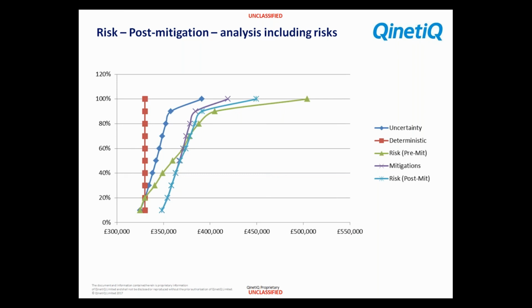Now, this is going to be relevant later on, but a lot of organizations pitch their budgets at 50th percentile. Okay, 50th percentile they choose because, well, if you do enough projects, some you win and some you lose. If you give your project managers a budget at the 50th percentile, you're not giving them an overly easy time. They know that half the time they're going to overspend, but neither are you giving them a really difficult time.